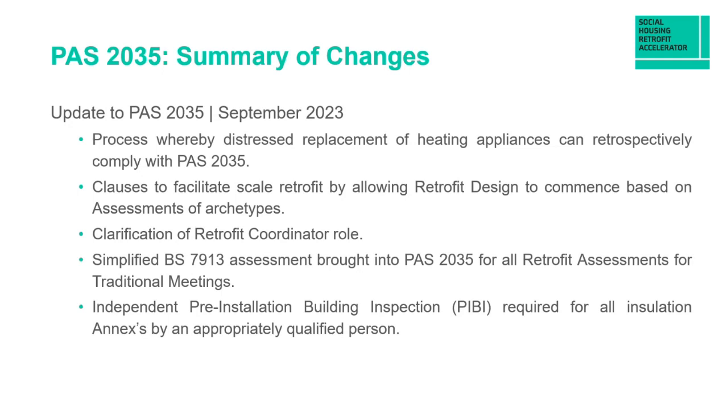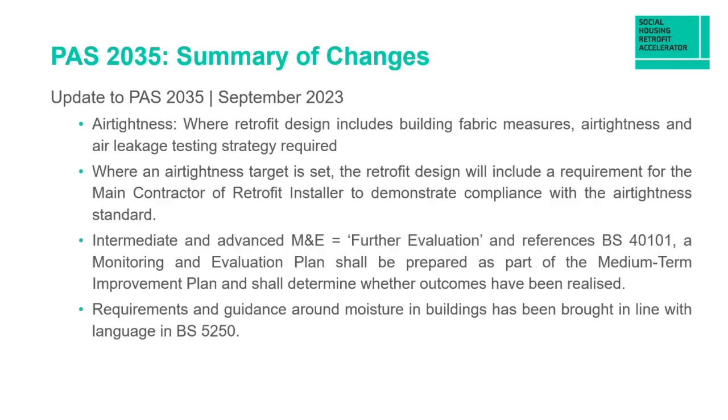So that is allowing the retrofit design to commence based on assessments of archetypes. There's been some clarifications made around the retrofit coordinator role. The simplified assessment has been brought into PAS 2035, as mentioned, and it's the introduction of an independent pre-installation building inspection for all insulation works. Some further changes, so air tightness. So where retrofit designs include building fabric measures, an air tightness and air leakage testing strategy is required.